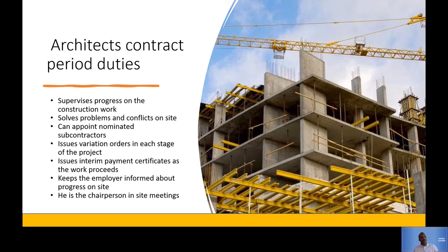And then also, very importantly, an architect issues interim payment certificates as the work proceeds. So as the contractor is building something on the building, on a monthly basis, you probably want to prepare a payment certificate to say, I've done this much work, please pay me for this much work.